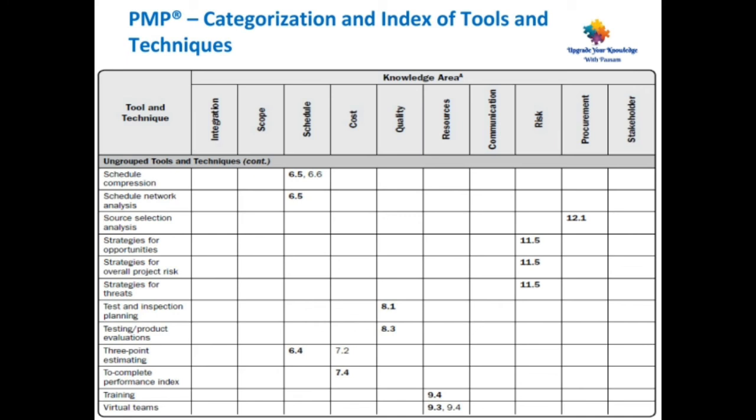techniques. Schedule compression is used in schedule, that is in develop schedule and control schedule. When you are developing the schedule, you use the schedule compression technique, and when you are reviewing the schedule timelines, there you use it in control schedule. And then schedule network analysis, again it is used in develop schedule.